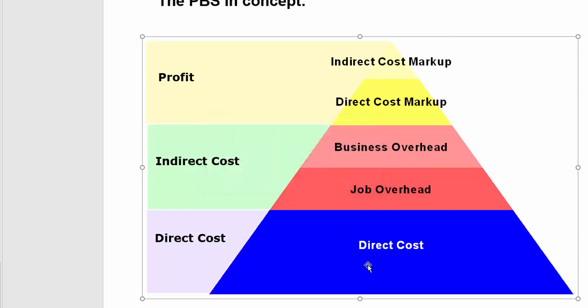Direct cost. Then two types of indirect costs, right? So everything is a cost until you get to profit, because overhead costs real dollars. This overhead pertains to the project specifically. Typically, it's the salaried personnel and all of the office supplies and facilities that are required to complete the direct cost items. Direct cost items typically are installed in the facility, all right? So when the builder leaves, those direct cost items are still there.